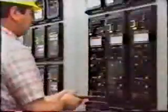Before carrying out any electrical tests on the relays, it is first necessary to check their physical condition. The relay panel and general areas should be clean. In particular, the relay case itself must be thoroughly dusted before the cover is removed. Make sure that the relay is isolated, then examine the internal condition of the relay for signs of damage in transit. Make sure that all moving parts operate freely and that contacts make correctly.